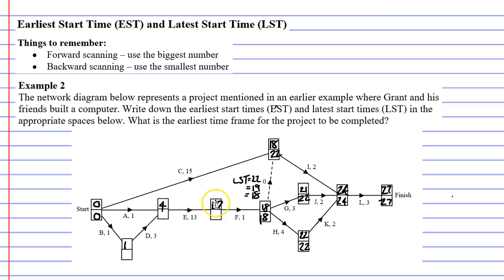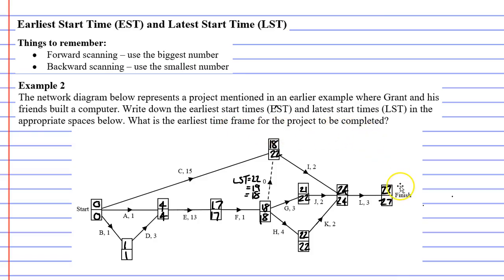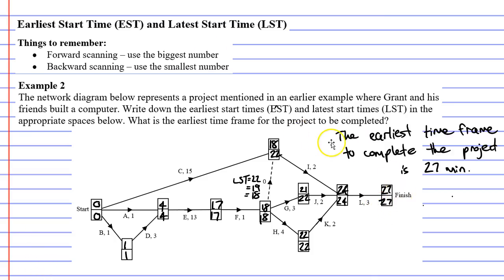Looking at the next vertex, 18 minus 1 is 17, so our latest start time is 17. Then 17 minus 13 is 4, so our latest start time is 4. And 4 minus 3 gives us 1. The start vertex always has a latest start time of 0. We have now written down all our earliest start times and latest start times. The earliest time frame to complete the project is 27 minutes.